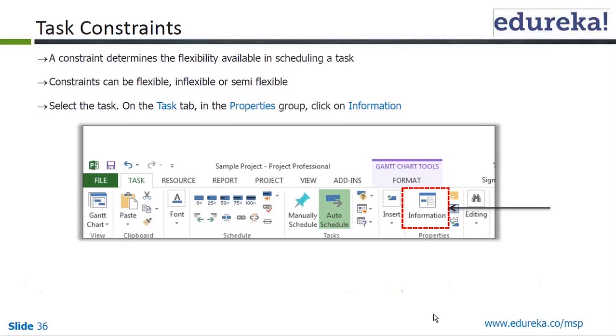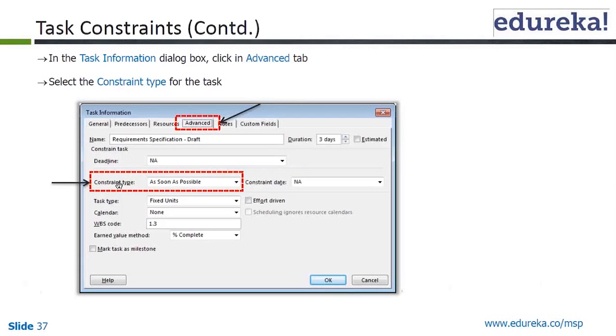To access constraints, select the task on the Task tab in the Properties group and click on Information. That's how you can essentially access the constraint settings.